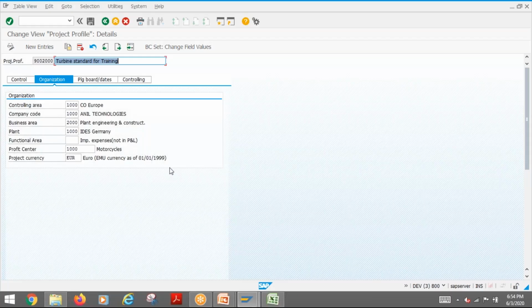If there is a hard and fast rule that it should be like this, fine, but SAP has given the option up to controlling area level, you can configure it. Different controlling areas, it's not possible. One controlling area, you can use it. Even one WBS you can use for one company code, another WBS for another company code. That is possible, no issue. Even in the IDES system, you will have examples of one company in Germany and one in the UK doing work in the same project. So it is not an issue at all. But again, it's all a business decision. Sometimes some people will say, no, we don't want that, so we have to respect them.